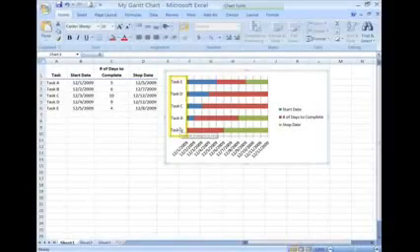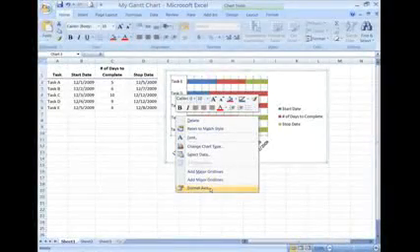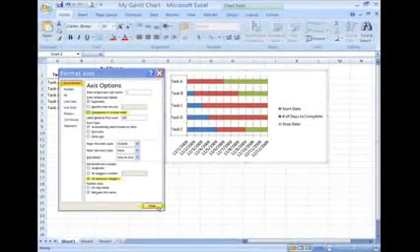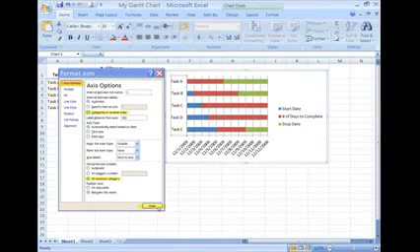Next, we'll make changes to the vertical y-axis. Click on the tasks to select it. Right-click on it to open the menu and click on Format Axis. The values in our chart go from E to A. We want to reverse that. In the dialog box, click inside the checkbox next to Categories in Reverse Order. Under Horizontal Axis Crosses, click in the circle next to At Maximum Category. This keeps our horizontal axis at the bottom of the chart. Finally, click the Close button.